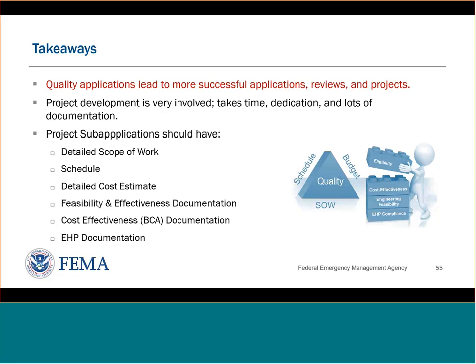Remember that a project sub-application should have a detailed scope of work, a schedule, a detailed cost estimate, feasibility and effectiveness documentation, cost effectiveness documentation related to the benefits cost analysis, and environmental and historic preservation documentation. Next slide, please.